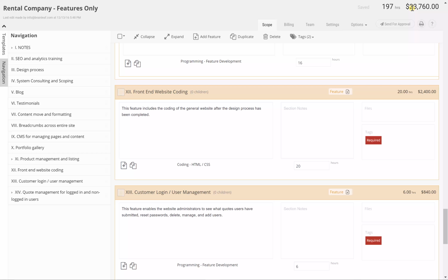And then we were able to come back to the client fairly quickly. I think this took us about 2 hours to write up and plan out and discuss with the developers. And we provided back to them $23,000, give or take about 20%. And this let everybody know exactly that we were talking apples to apples. They weren't expecting $5,000 and we weren't expecting $100,000. This just put everybody on the same page.